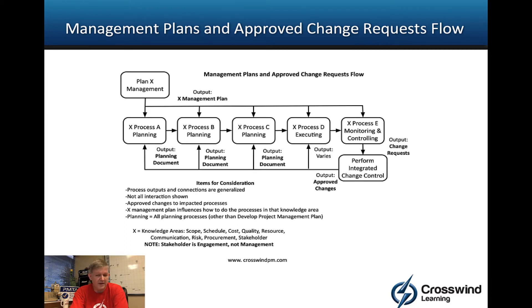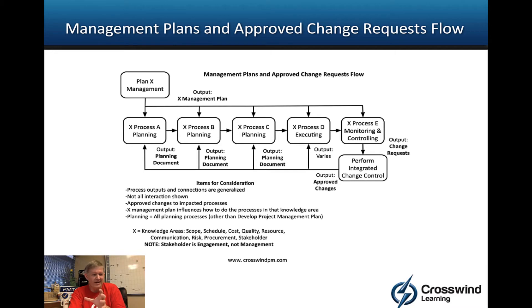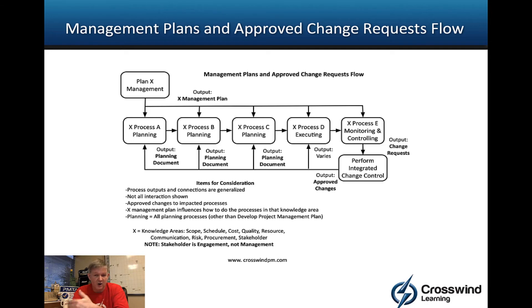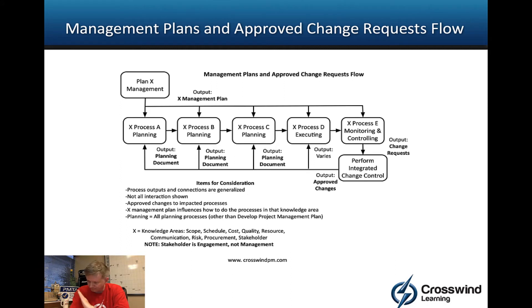Then we get into monitoring and controlling — meaning we're validating whether our planning documents are doing what we intended, and whether the executing process is producing what was expected. As a result of that monitoring and controlling, we could potentially create a change request or change requests. For example, control scope, control schedule, etc. could produce change requests.